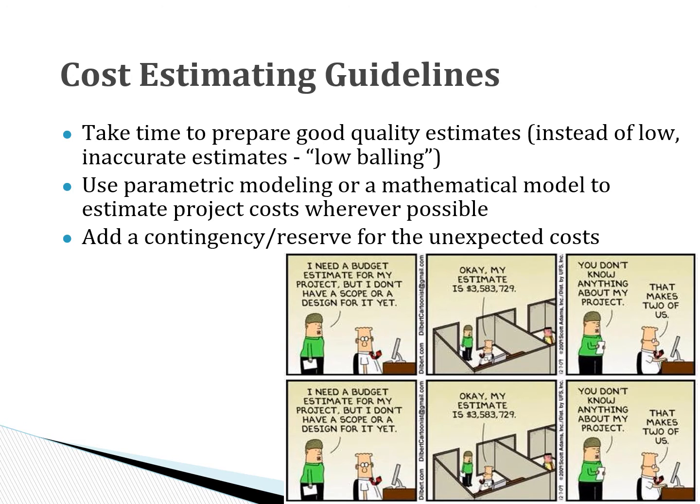And the other thing to keep in mind is that the estimates that we put together are simply forecasts of actual costs, and their accuracy depends on how much we know about the task and how accurate our assumptions were. To take into account inaccuracies that exist in estimates, we add a contingency to our estimates to anticipate that some of our estimates will fall short of the actual costs.